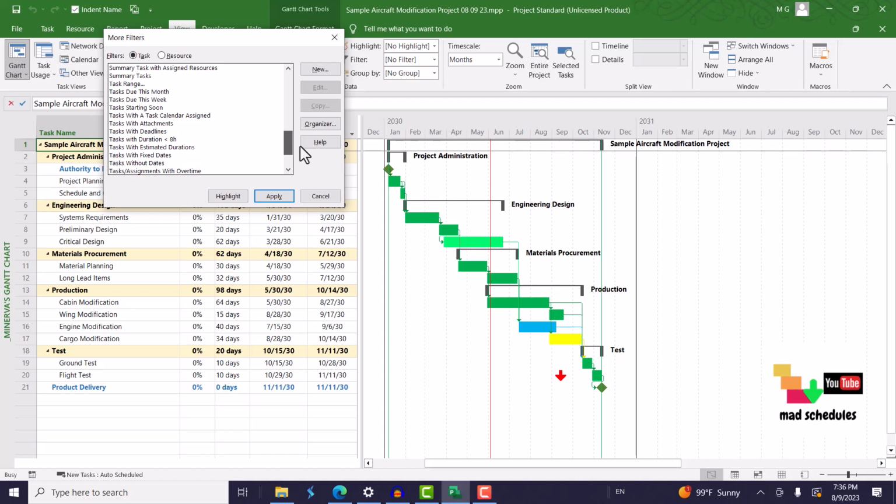Cost can be taken care of somewhere else, like in a cost system. Because when you build a schedule, the schedule is the one that you need to use to cost your project. You don't do it the other way around, and sometimes that gets confused. So it's better to build a schedule and then work from there.